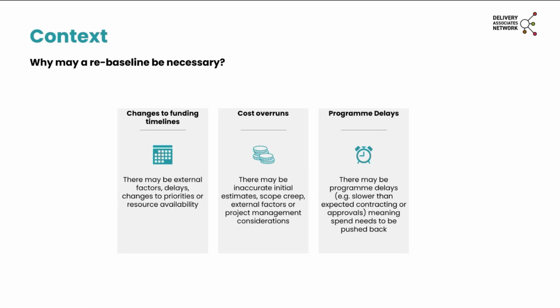So a budget rebaseline is a formal revision of the original budget plan during a project or a programme. It's not simply an adjustment for actual variances, but it's a fundamental realignment of the budget to reflect significant changes to the project. Rebaselining the budget might involve rebaselining the value, but also the time horizon of the budget as well.